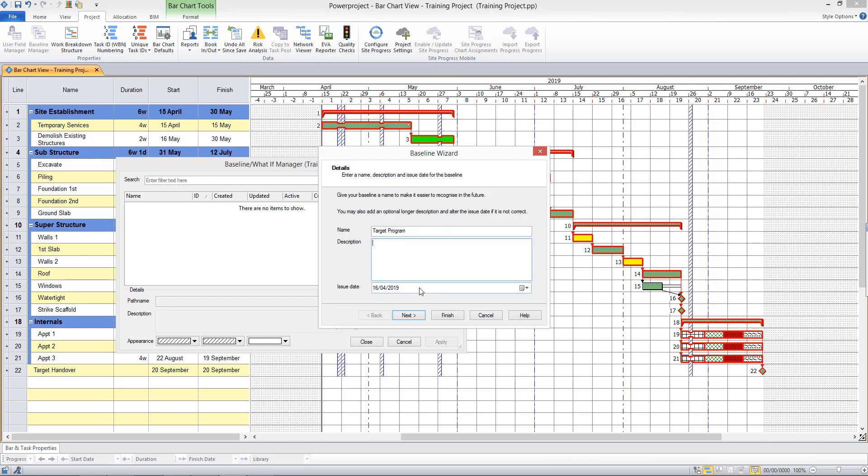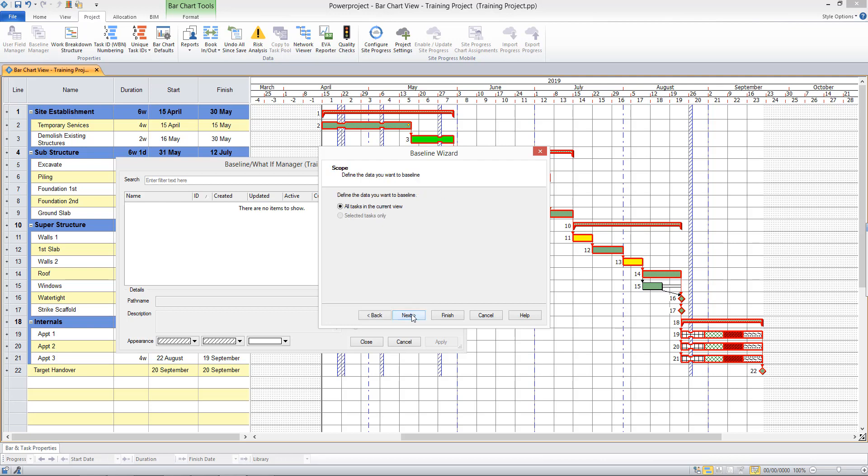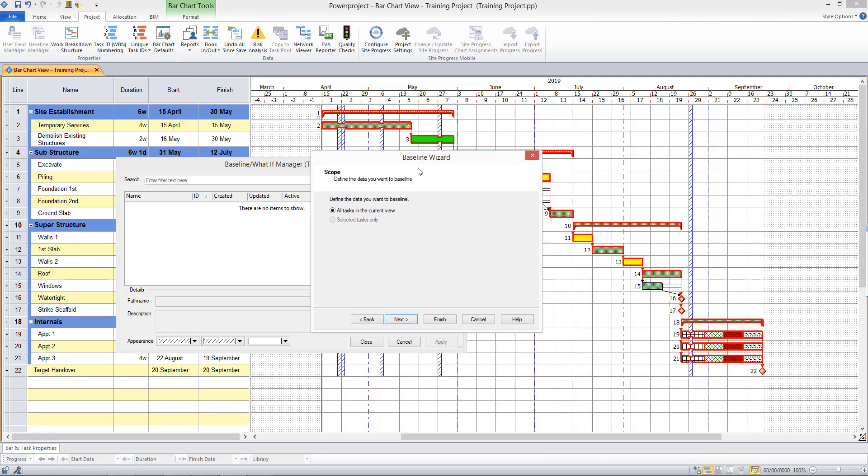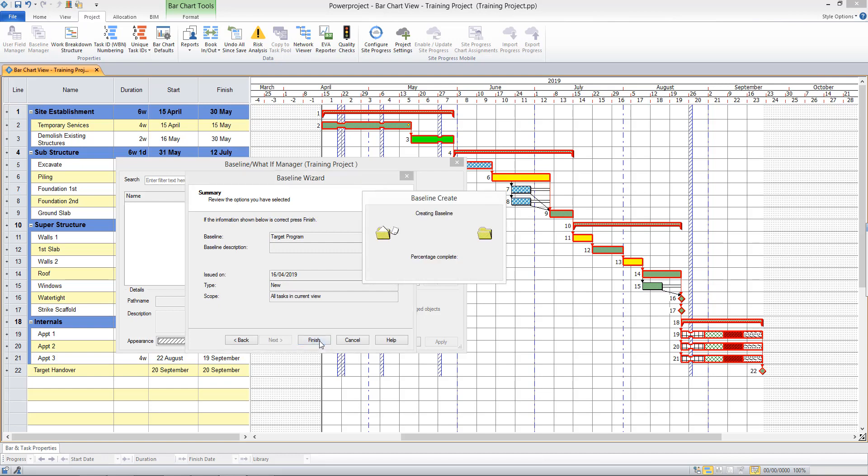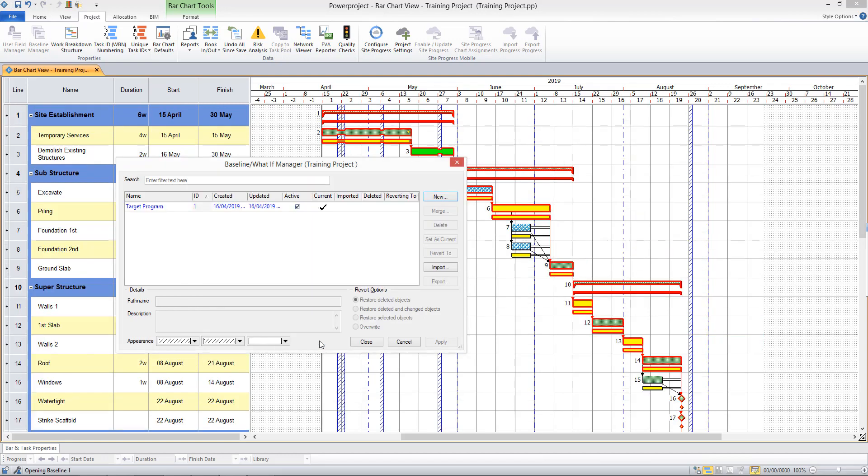I can enter a description if I wish. That would be useful if you think you're going to be creating multiple baselines during the life of your project. A description as to why you took each baseline could be useful at this stage. I'll click Next. Now I want to define the data I am baselining. I'm baselining everything that I see in the background here. Next, and that's all there is to it. I click Finish. My baseline is created.